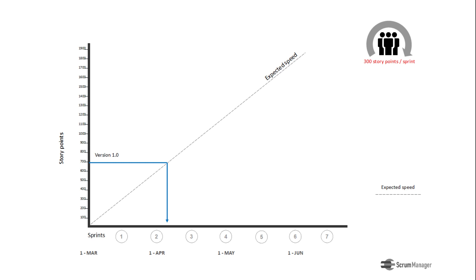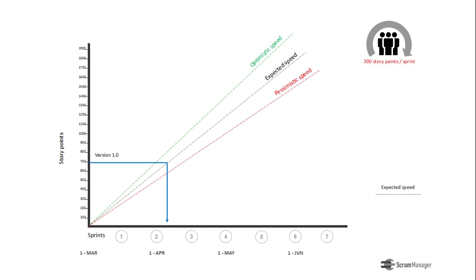If the margin of deviation from the average speed is known, the graph can be complemented with the speed lines that would project an optimistic estimate, according to the best times recorded by the team, and the line of pessimistic estimation, reflecting the slower times.